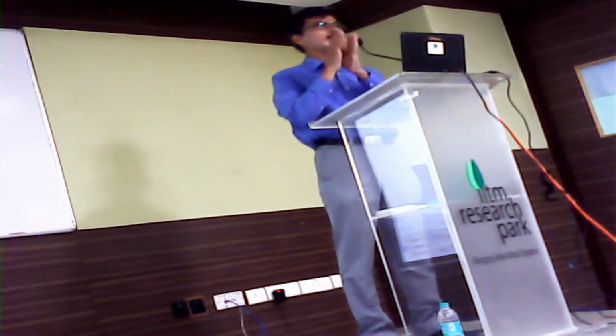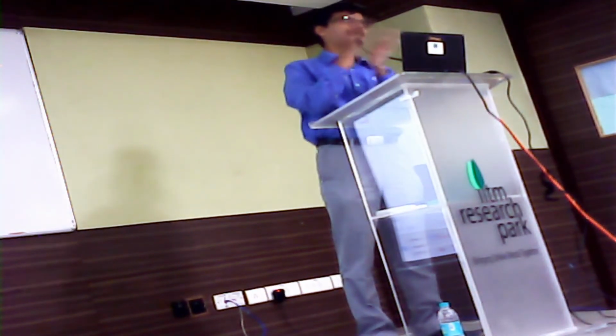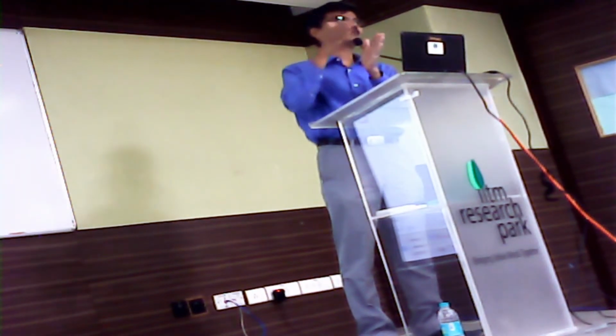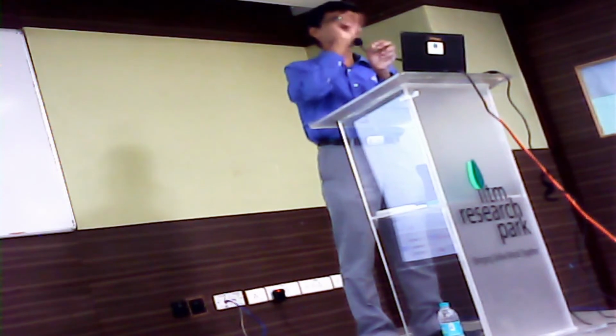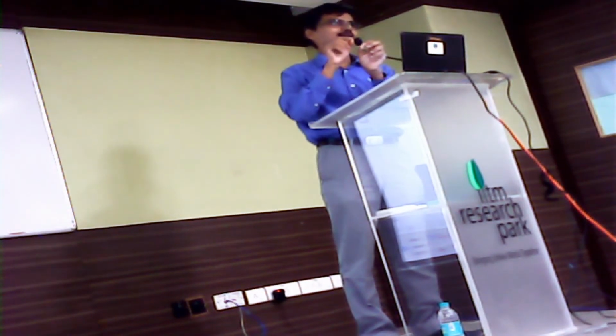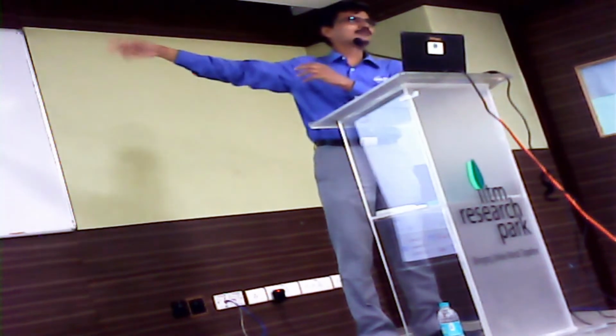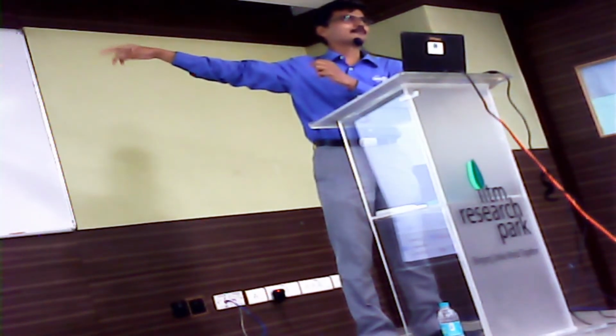So when you record your actual duration, if it is more than the remaining duration, Project will automatically reset the remaining duration to 0. That's the default behavior. So you need to explicitly say there is some more days left. Record it. Now I hope you could understand how this 78 is calculated.